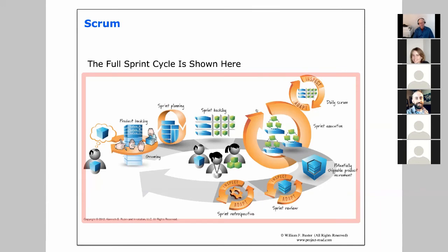And at the end of it, we're going to have a meeting to review what we built. That might be just 2 to 4 hours. And then a sprint retrospective, that might be just 30 to 60 minutes. So as much time as possible is preserved for actually doing the productive work.